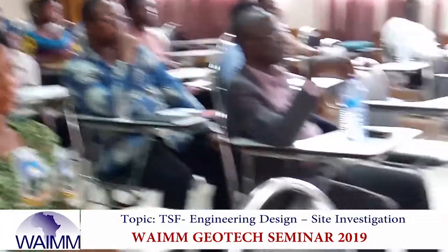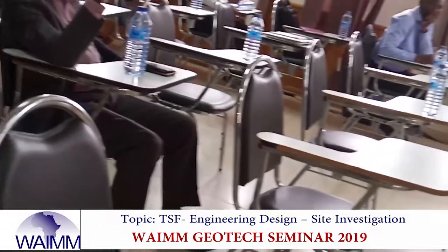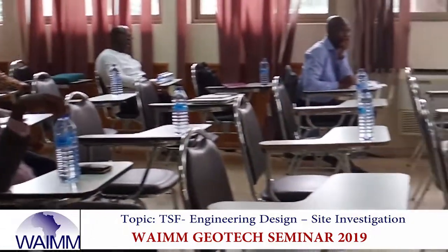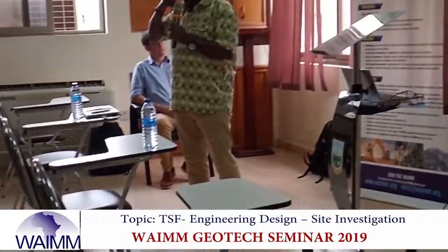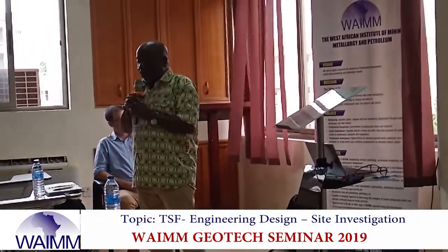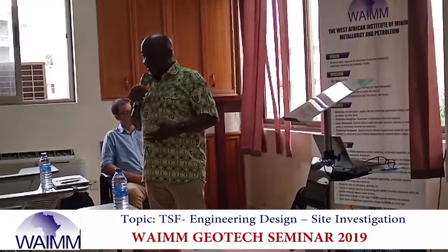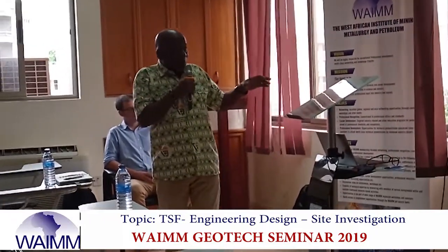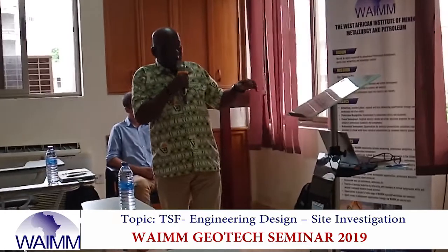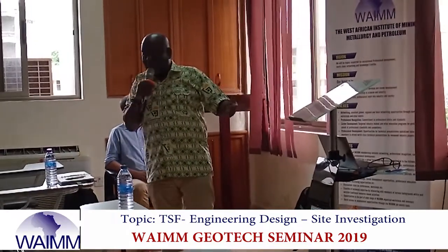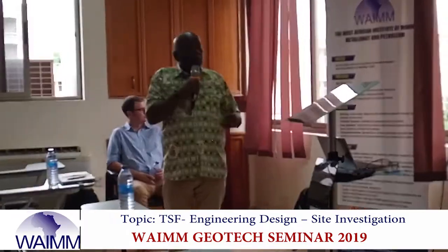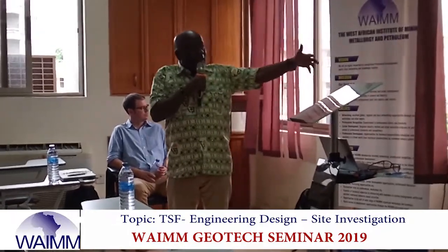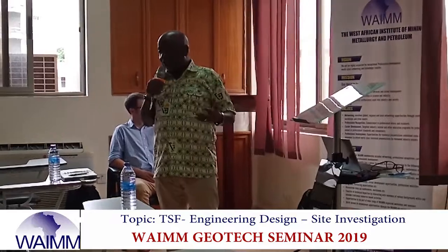This information normally will go into your EIA when you are describing your project in the EIA. This information is good and acceptable for permitting purposes, and also based on that initial work, we'll be able to refine the cost of the site investigation.